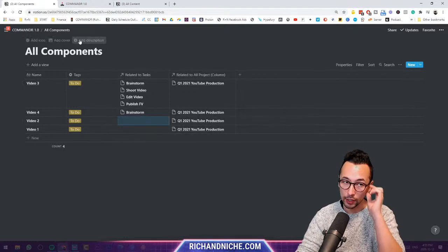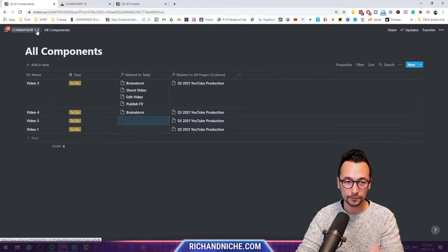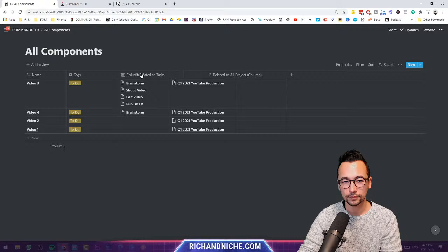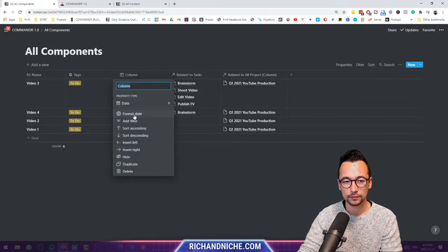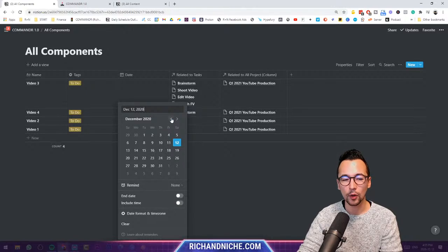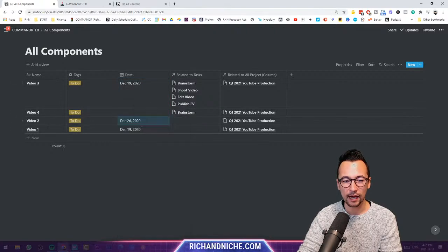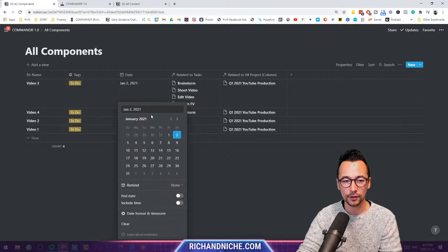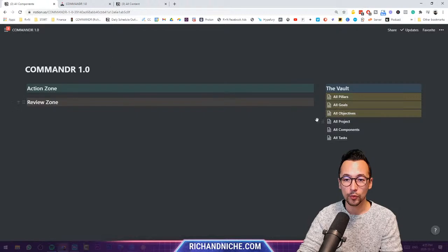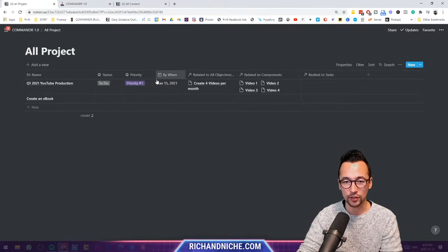I don't want to write them all out to save time. Okay. And these components should have a due date as well. Say video 1 needs to be done by next week. Video 2 needs to be done the week after. Video 3 the week after. And let's just assume that all gets us to our bigger project date of Jan 25th, right? You'd want all that to be related.